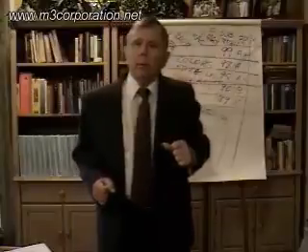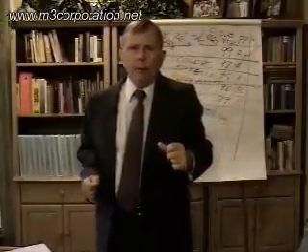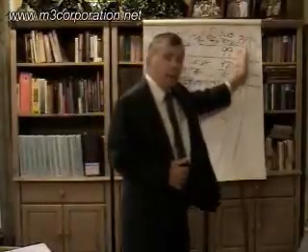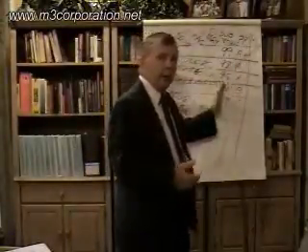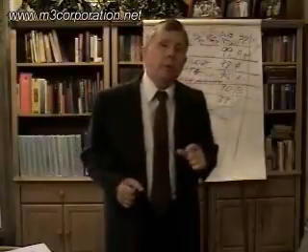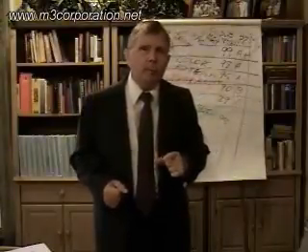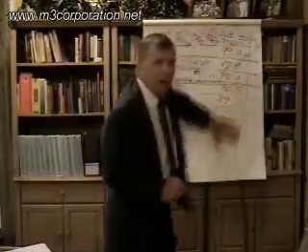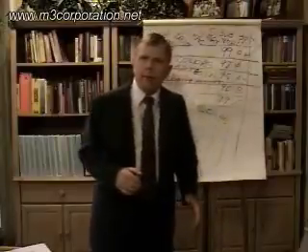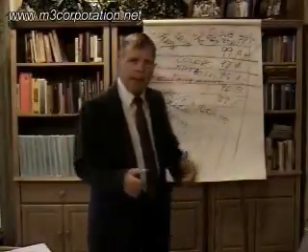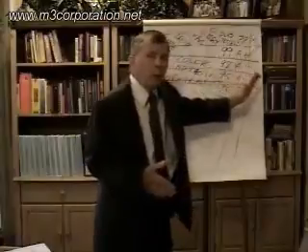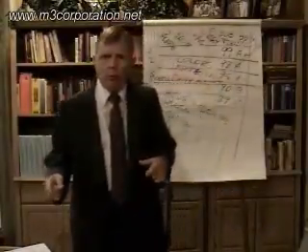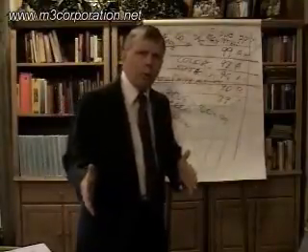I mentioned that I didn't actually give past performance a weight, because we normally would put past performance on the right-hand side of the subtotal. Now, what does that do to the value of past performance? It increases that value because now it is equal in weight to the other evaluation factors. And so past performance becomes an extremely important factor in the overall evaluation of who we're going to make the